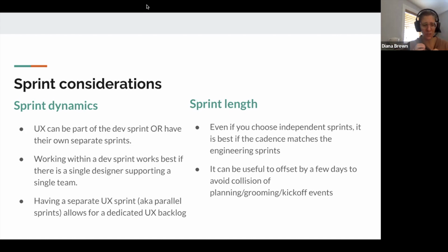Planning, I might try to keep in the team as much as possible, simply because planning is a little bit less. It's just saying, okay, these are the tickets I'm going to work on, and doing that in the same room with the entire engineering team, the entire Scrum team, creates awareness of what you're working on, which you really do want. But the grooming, which is the deeper dive into what's the priority, what does this mean, and what does this task look like, can be a smaller subset. Maybe only the people working on the tasks that you're grooming can be in the room.